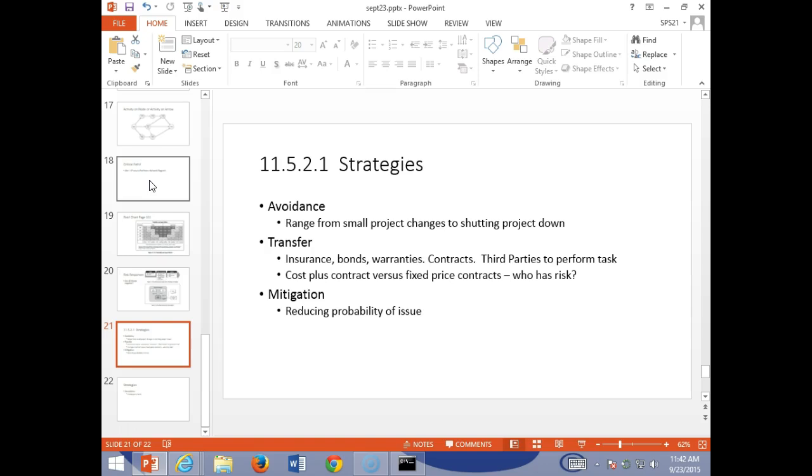No. So contract law. If I set a fixed price contract, so I tell Peru that I'm going to build this curb for $1 million, and as a construction company, I've set a fixed price, and it costs me $1.5 million to build this road. Who bears that risk? That fixed price contract, who bears the risk? Does the person doing the contract, or the person that owns the job eventually? So here, it'd be that construction company on a fixed price contract bears that risk.